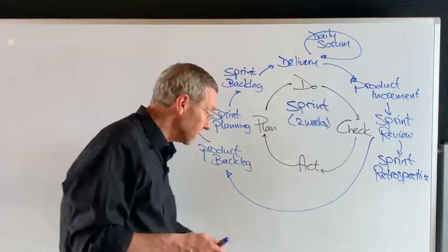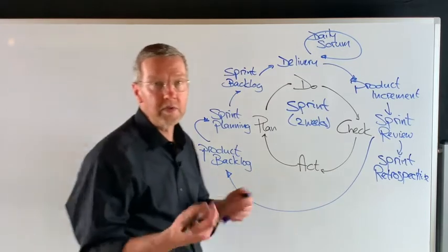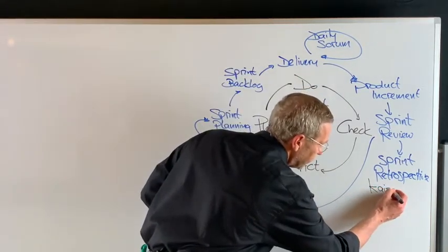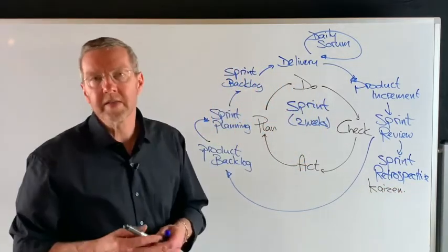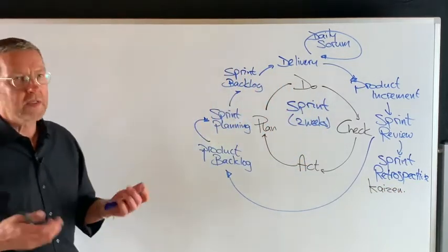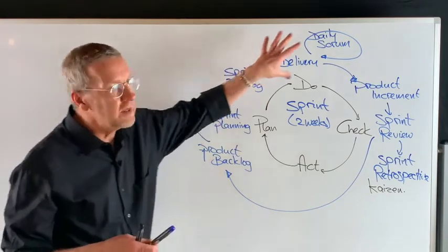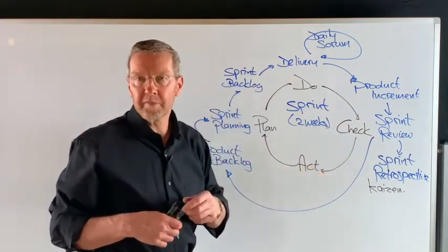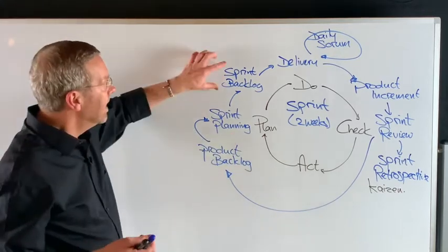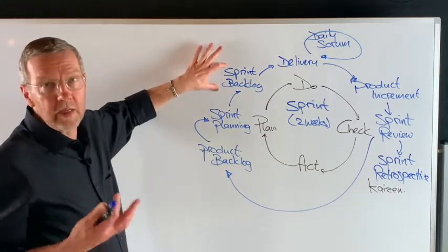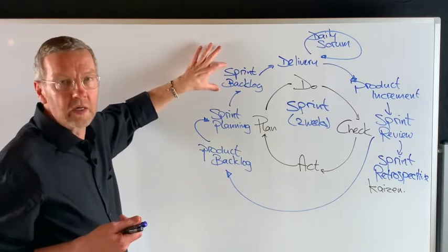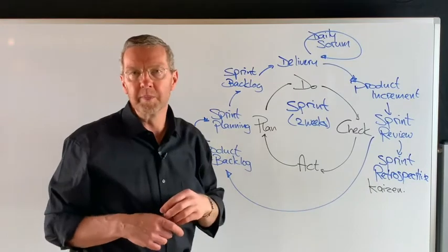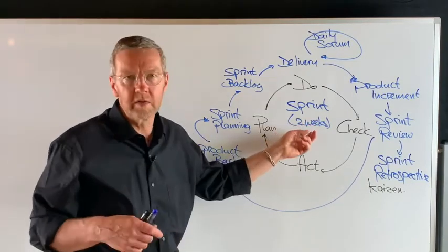This is essentially a Kaizen event, if you want to use the lean language. A Kaizen event where the output gets reflected in all the different activities, and to remind the team of the improvement activity, there are teams who put that improvement at the top of the backlog. Most teams pick only one improvement. Don't boil the ocean with improvements in two weeks. That's just not feasible, not possible.